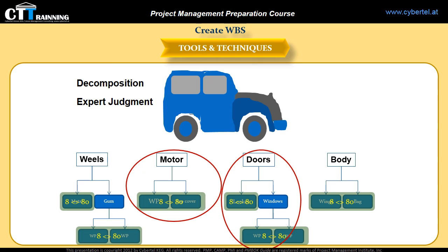the work. However, excessive decomposition can lead to non-productive management effort, inefficient use of resources, or decreased efficiency in performing the work. We may hear about rolling wave planning. Those are projects or deliverables that will be accomplished far into the future, and creating the WBS may not be possible. Here, the project management team waits until the deliverable is approved, then starts to develop the detailed work breakdown structure. This is the rolling wave planning.